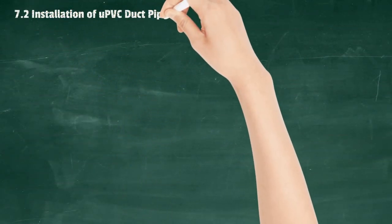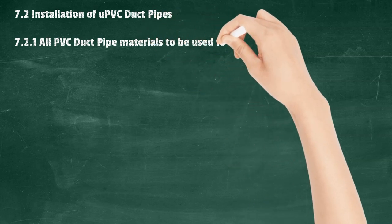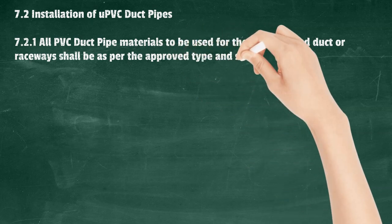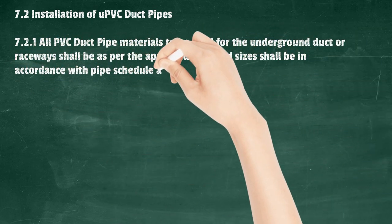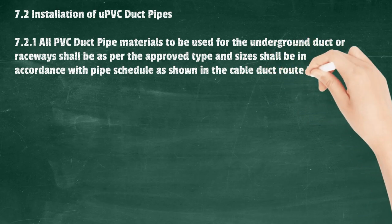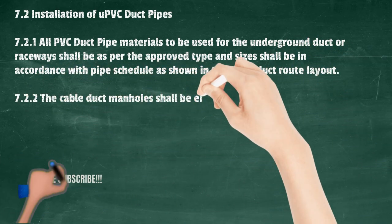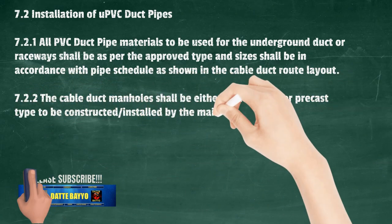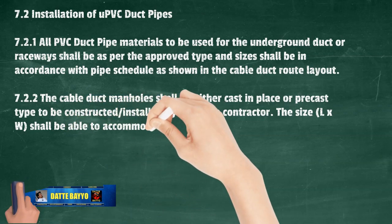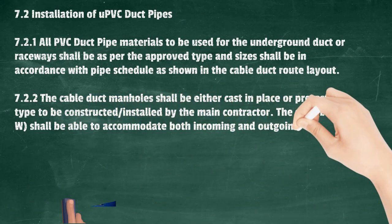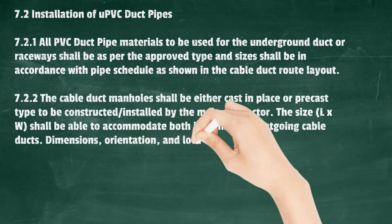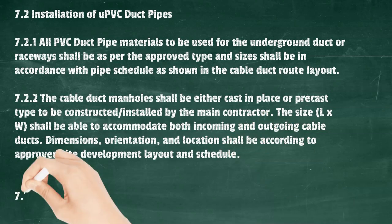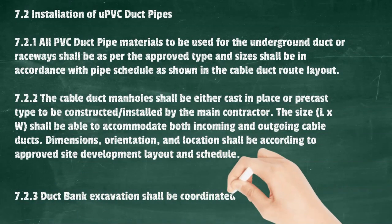Installation of UPVC Duct Pipes: All PVC duct pipe materials used for underground duct or raceways shall be as per the approved type and sizes in accordance with the pipe schedule as shown in the cable duct route layout. Cable duct manholes shall be either cast-in-place or precast type, constructed/installed by the main contractor. The size (L x W) shall accommodate both incoming and outgoing cable ducts. Dimensions, orientation, and location shall be according to the approved site development layout and schedule.